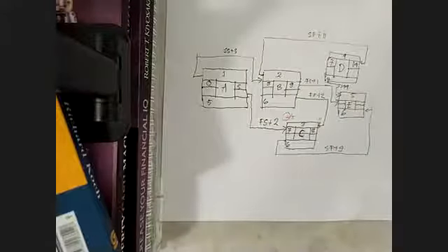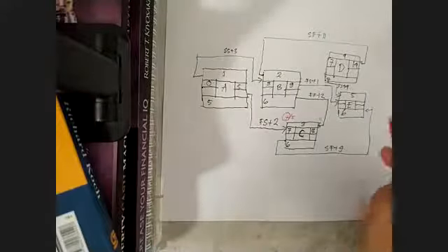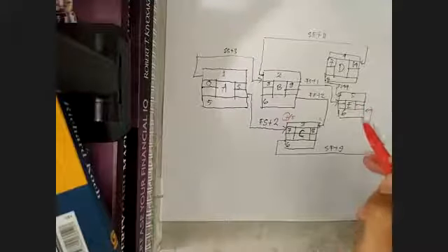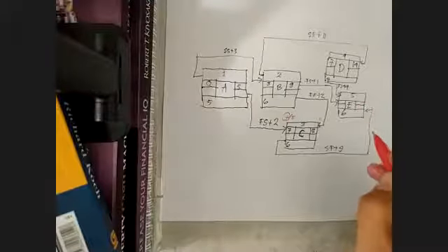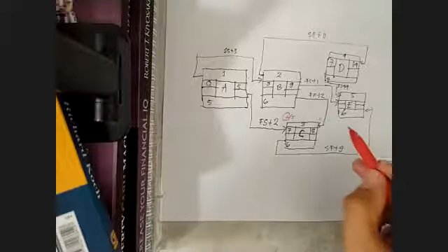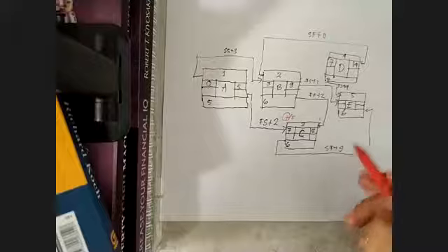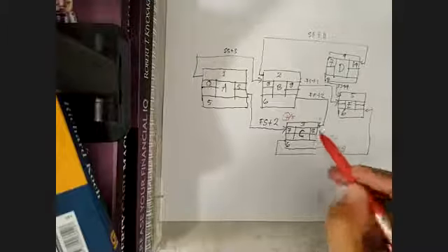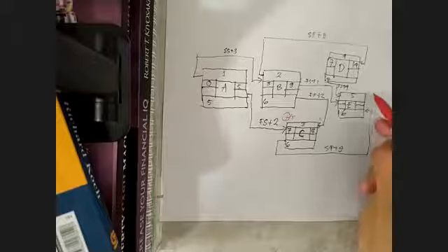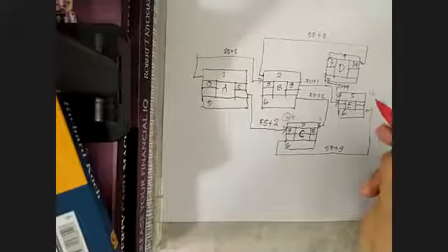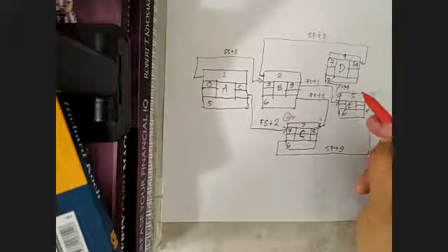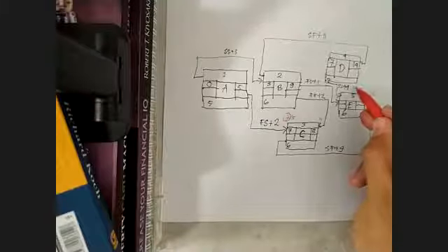Okay, next. What we will do next is calculate all the arrows. So the first thing that we will calculate, let's start from this one, SF plus 9. So we will calculate 7 plus 9. We will get 16. And then 16 decreasing with 6, we will get 10. This is the first option.